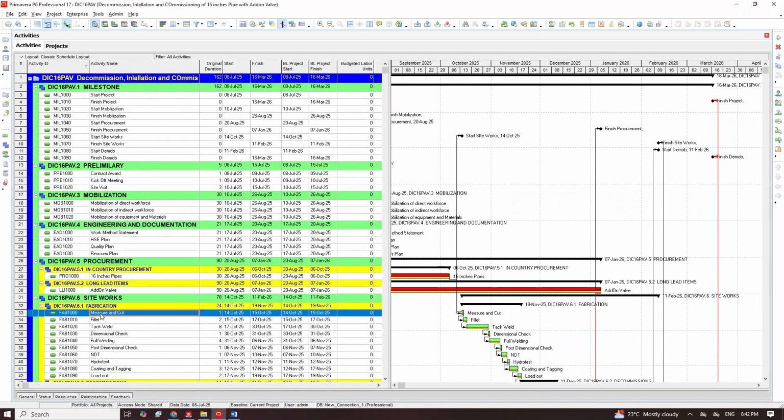This is basically how you get it. So you just keep on doing the division, right? Automatically you just see the number of persons you want to use. So in those cases where your engineer or your PM will say you should recommend, that's how you recommend, and we call it productivity. You will use the productivity rate to get the number of persons you are going to use. And if by any means they say you should reduce the duration, you already know you are going to increase the people doing the job. Okay? And that's just how that one goes.